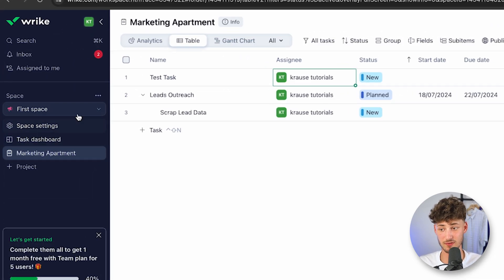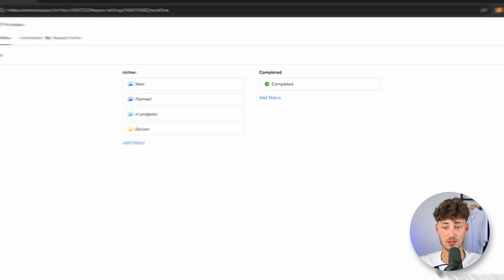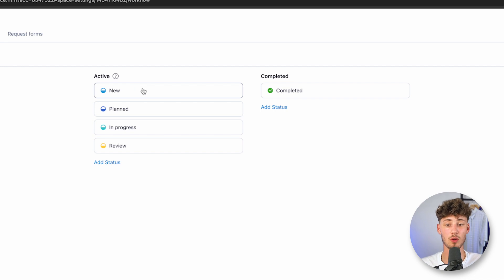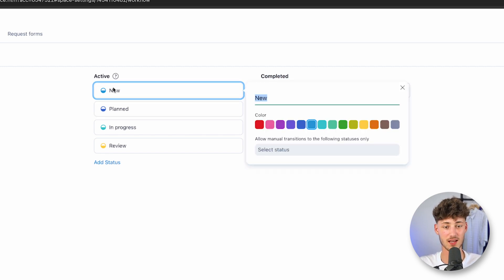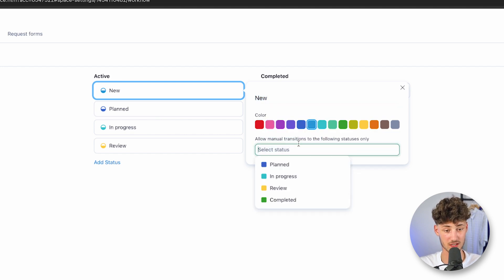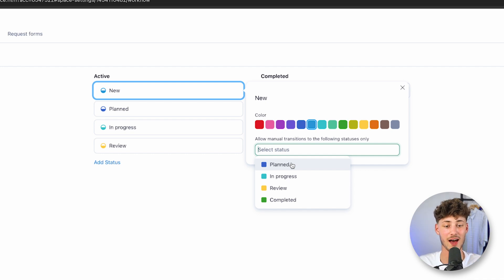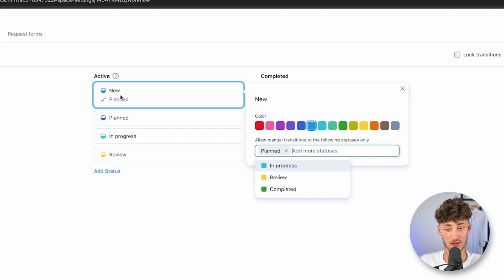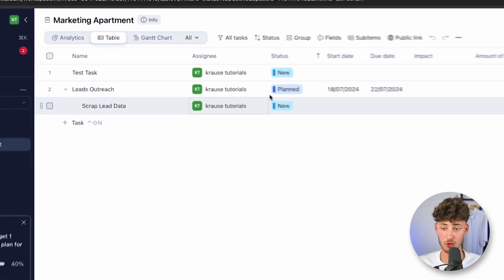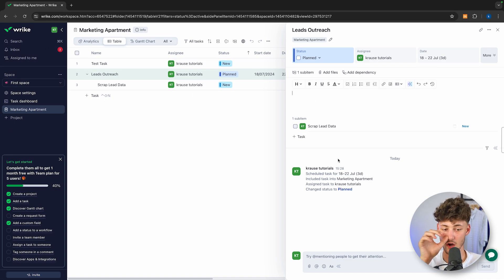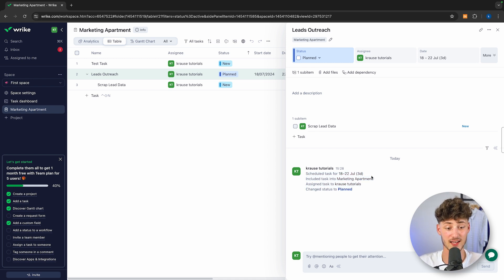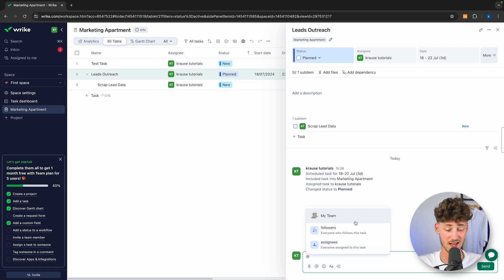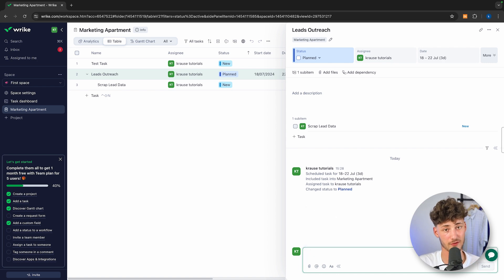Within your space views, if you head over to Settings, you also have Workflows. Here you can see the active workflow statuses: New, Planned, In Progress, Review, and Completed. You can customize these with text and color. You can also allow manual transitions to following statuses only — for example, if something is 'New,' it can only transition to 'Planned.' Once you click on a task, you get the description, as well as an overview and a chat for that specific item, where you can mention certain people inside the workspace — a great way of sending reminders and information.